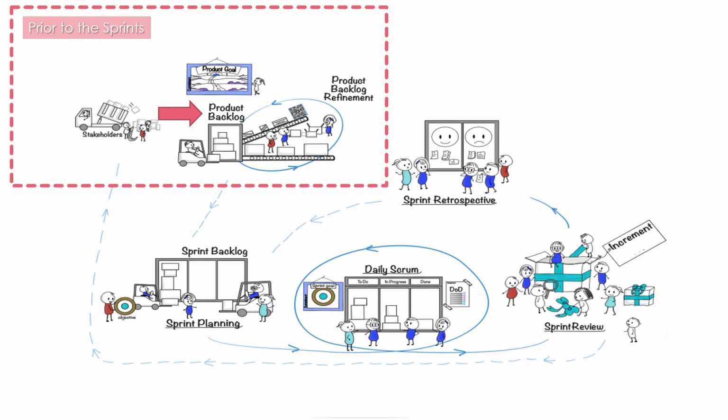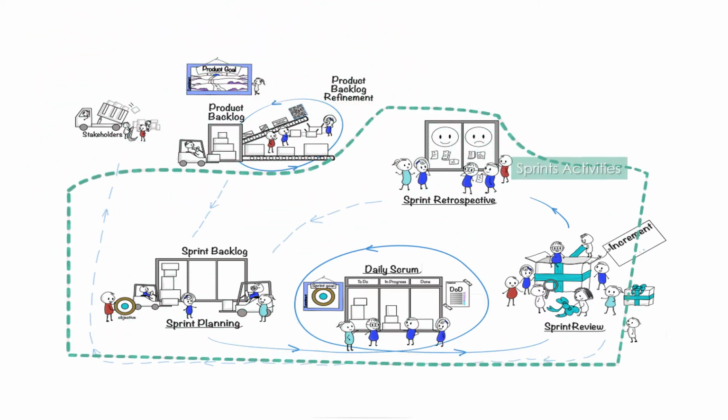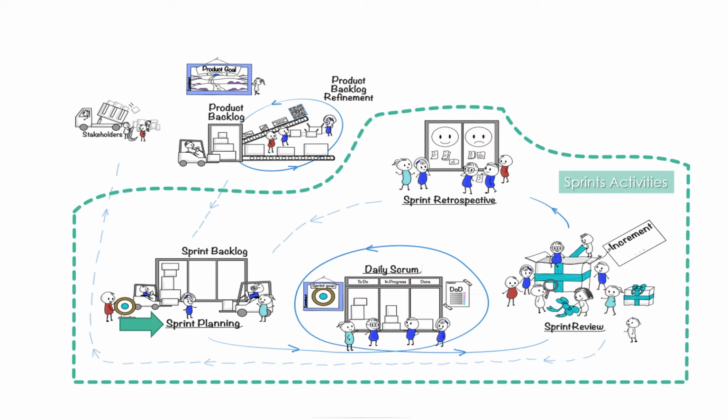Okay, so now let's talk about what's happening during the sprint. Sprint planning meetings are held to plan what will go into a sprint, a fixed period of time used to deliver parts of the final product. The product owner prioritizes these requirements and therefore decides indirectly on the contents of the sprint backlog.